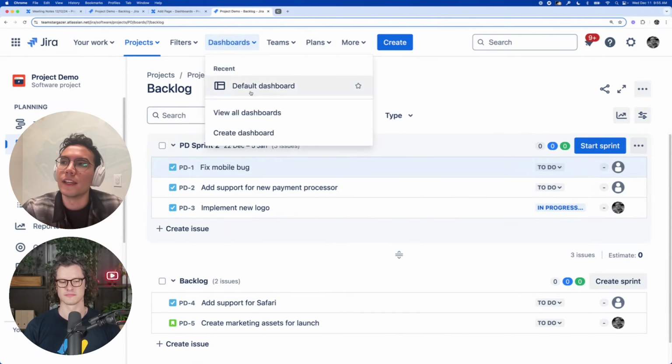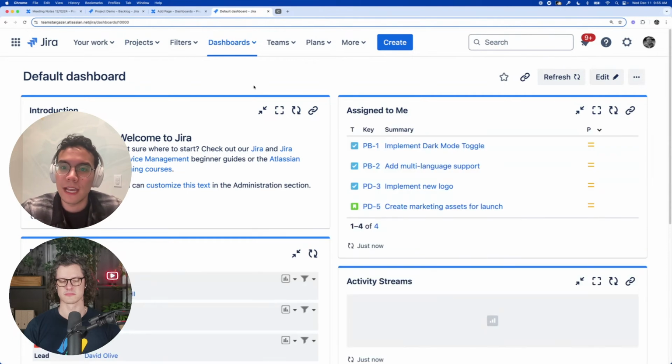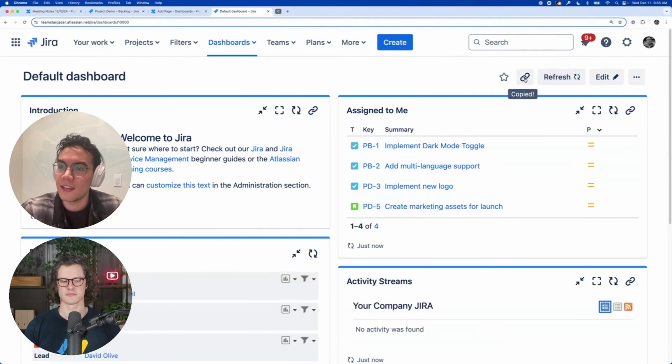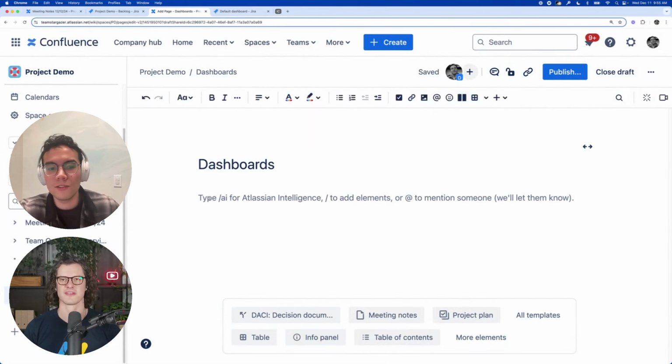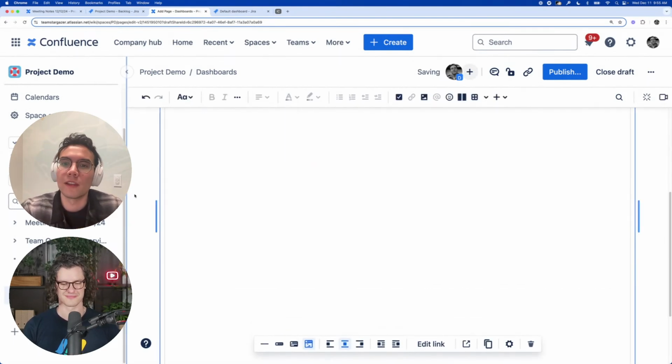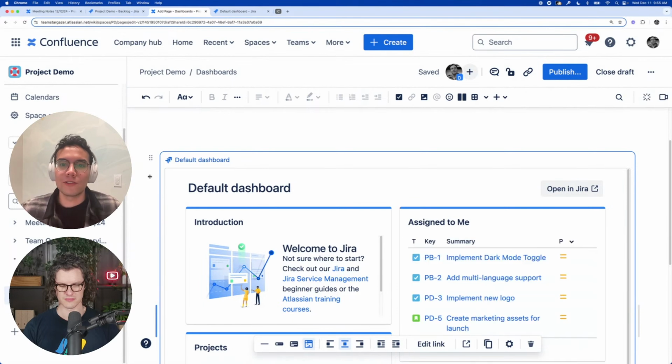if we open up a dashboard, what we recently added is now you can actually take an entire dashboard. And you can actually, with all these charts, you can put whatever gadgets you want inside this dashboard that is supported. Then you can take that and you can go to a Confluence page and you can paste it as a Smart Link embed. So you can actually take that entire Jira dashboard and put it into a Confluence page in case you want to show that to stakeholders, or it's just for general tracking purposes, or it's for status updates, etc., or quarterly report, monthly report, etc., to management.